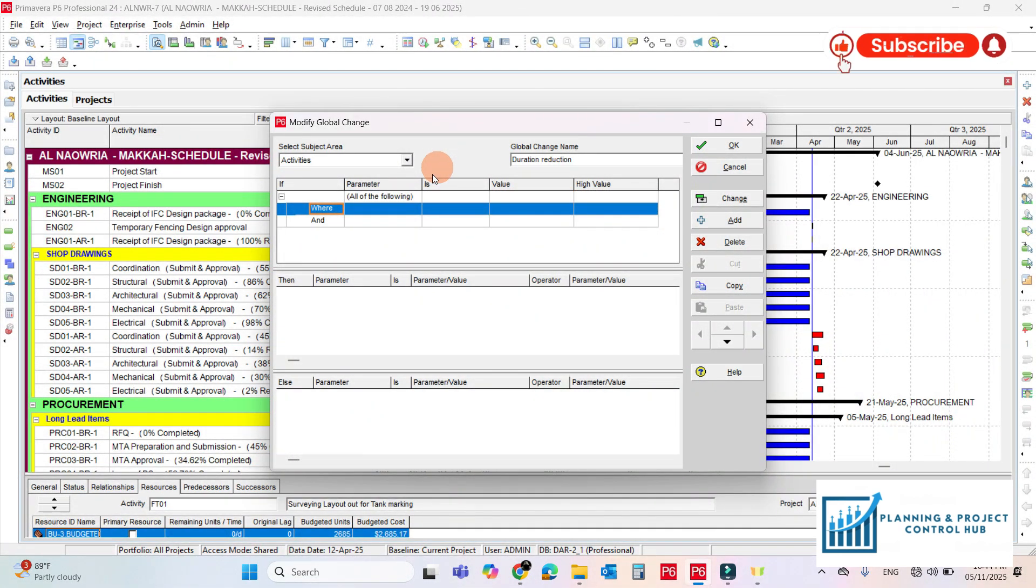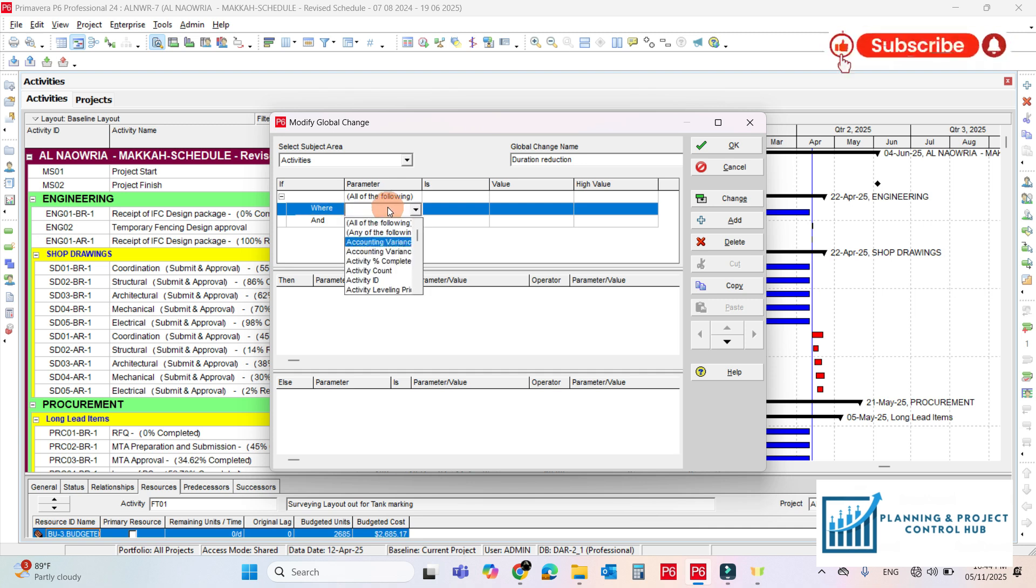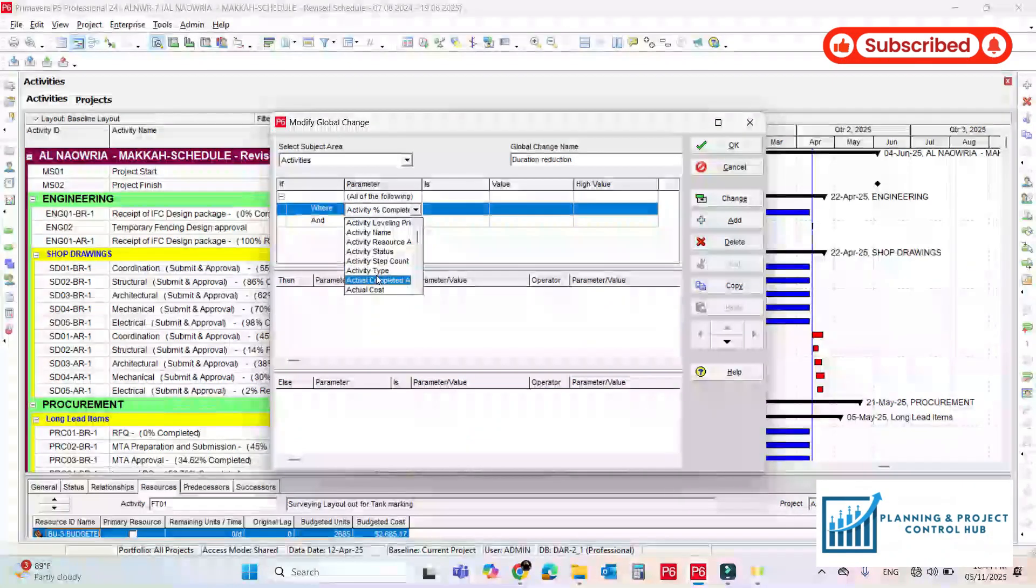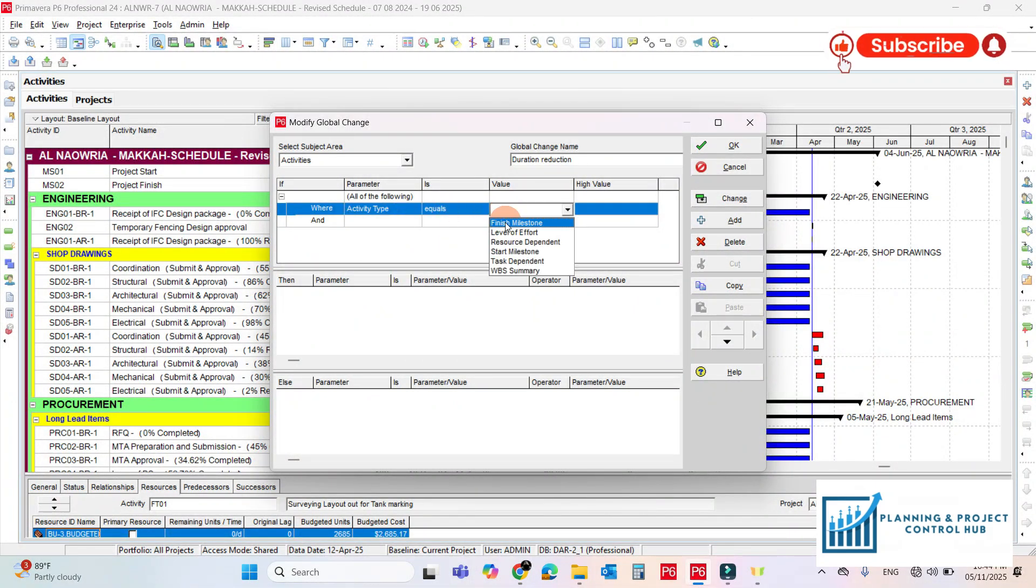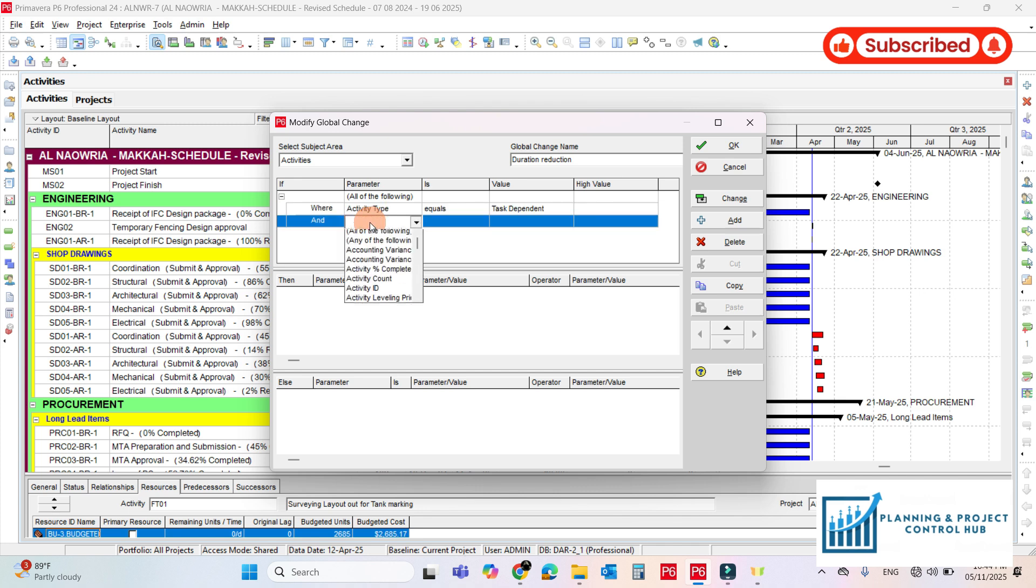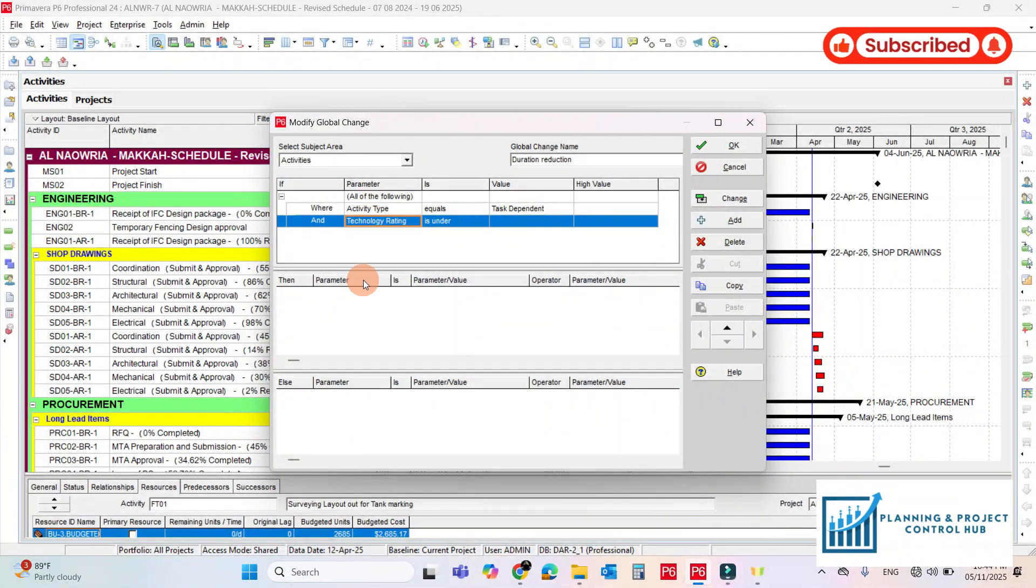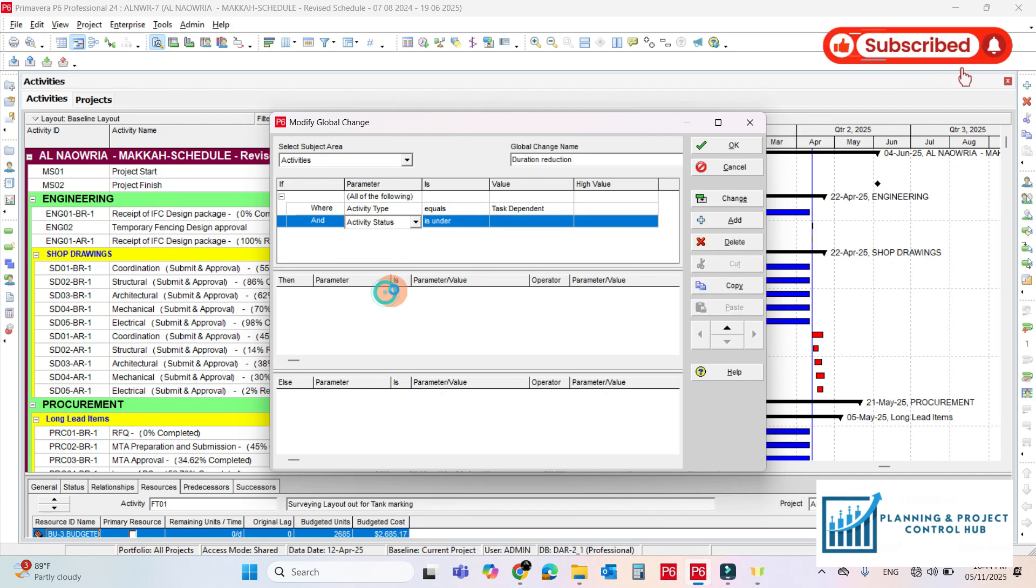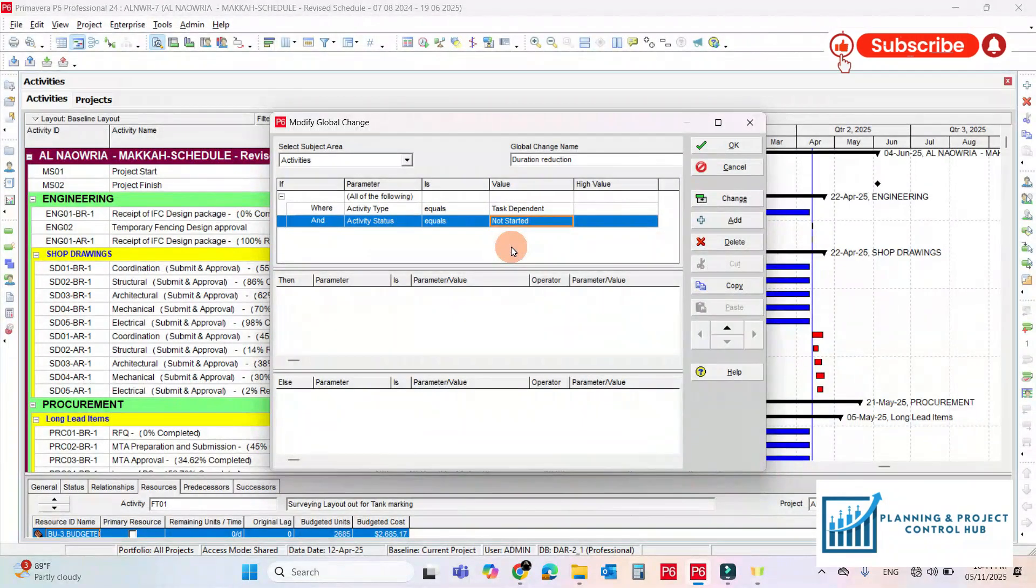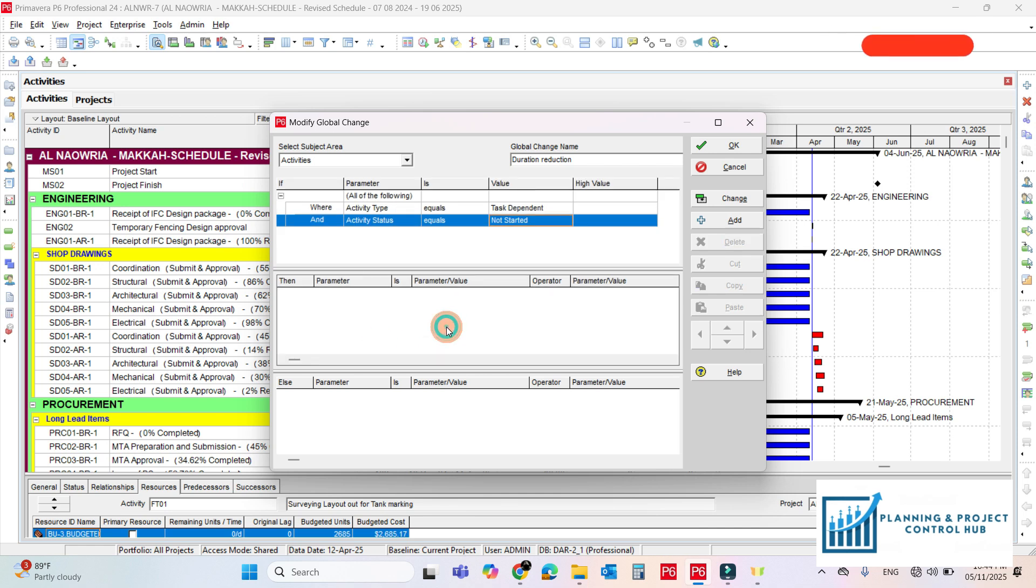Okay now apply the condition here. Activity type, it should be task dependent. Activity status, it should be not started. And write here the result.